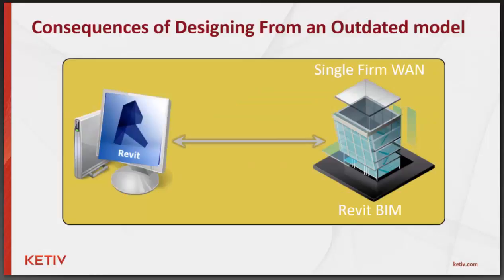Another consequence resulting from using an FTP site or Dropbox to download and upload these files for a Revit project was once I downloaded the architect's model and saved it on our network, I was essentially designing from an outdated architectural model. With multiple submittal phases, the architect's model was constantly being changed, and sometimes they didn't require us to upload our models for a couple weeks or even longer.